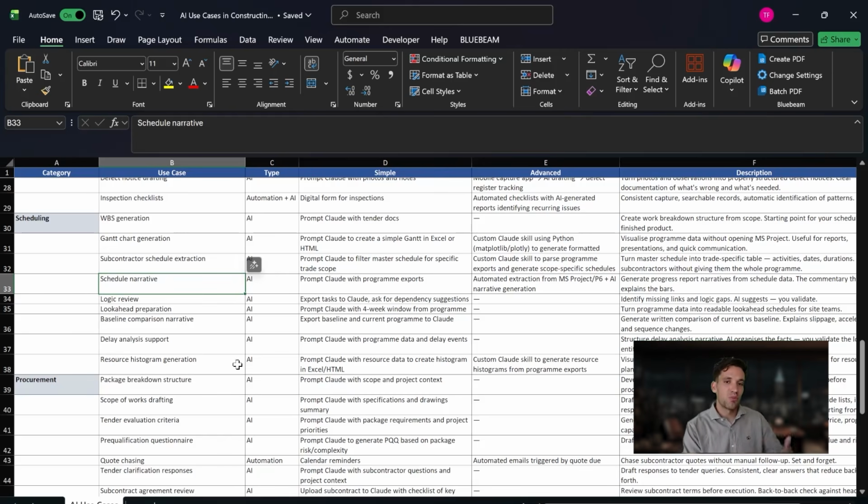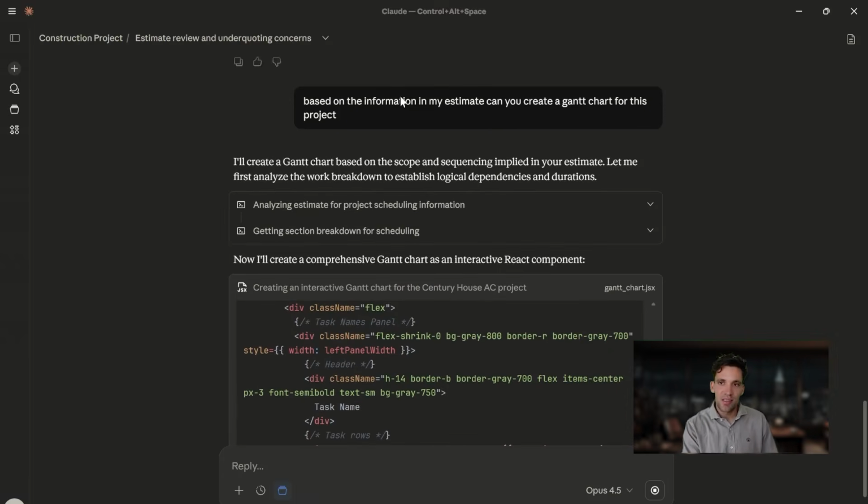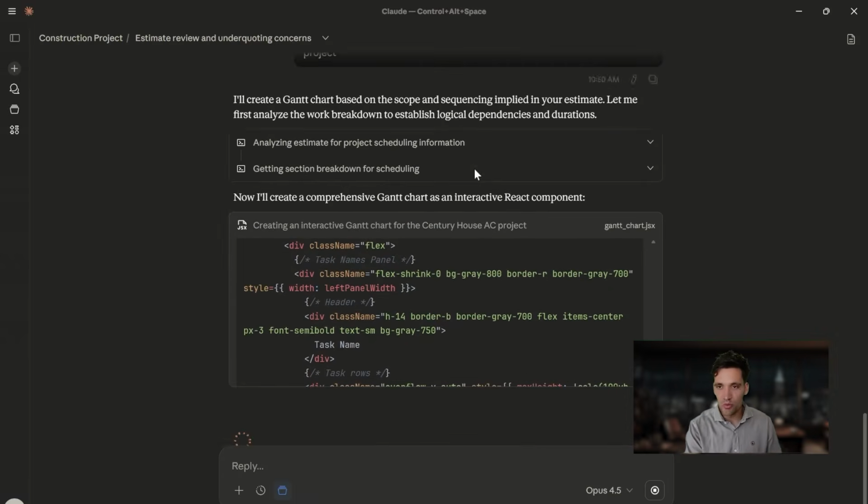You can help it to support extension of times claims by developing a schedule which has all the client milestones on the critical path. You could upload that, explain what's changed, why a delay exists, and get AI to help you prepare an extension of time. I mean, the simplest use case to experiment with is to actually use AI to prepare a schedule though.